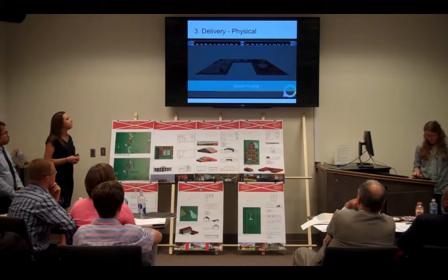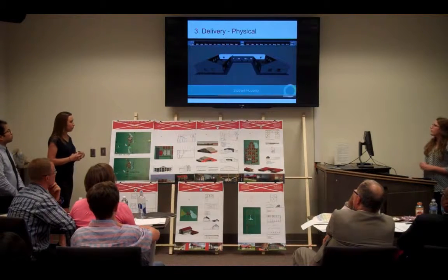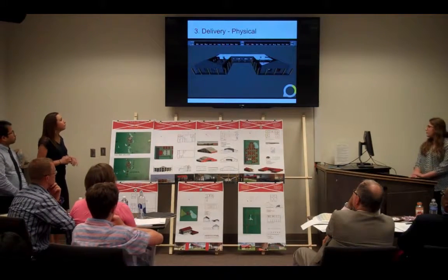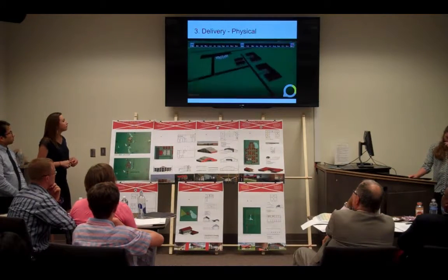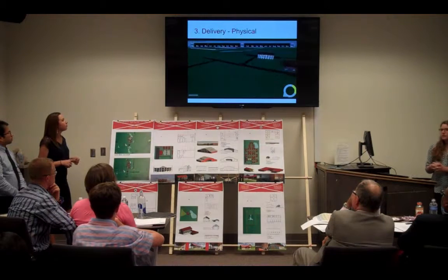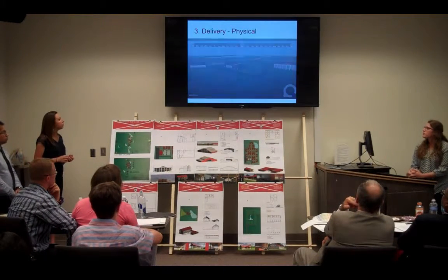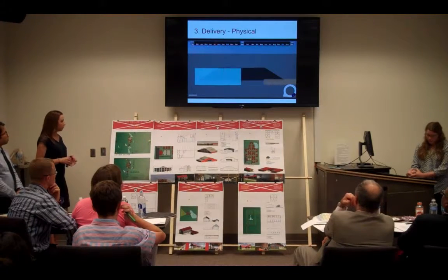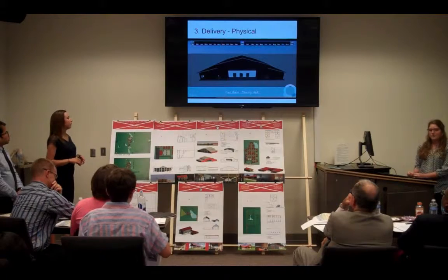The student housing has a total area of 6,600 square feet and takes around 5 months to construct. A single unit costs around $460,000. The Red Barn has a total area of 8,700 square feet and takes around 5 months to construct. A single unit costs around $1 million.